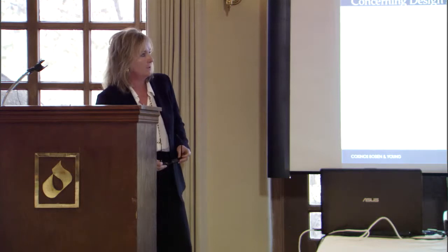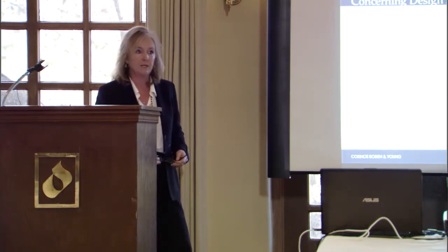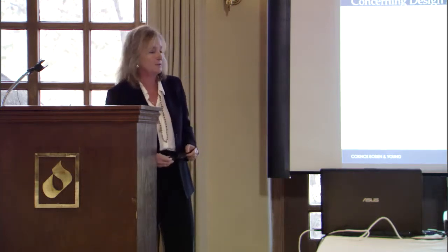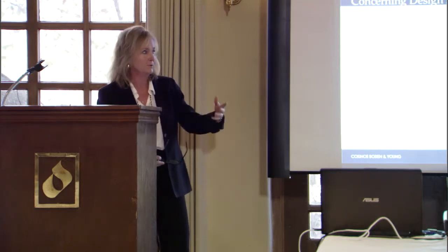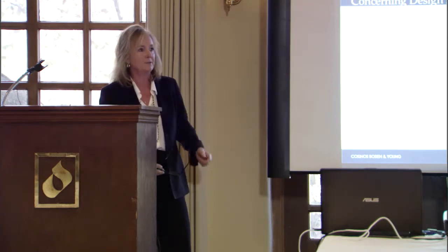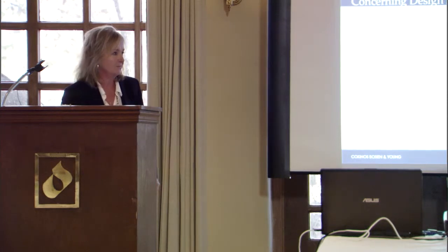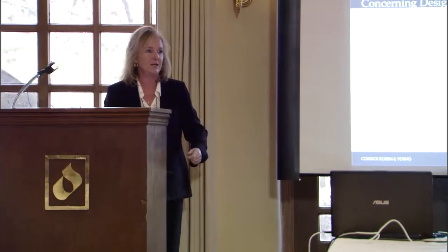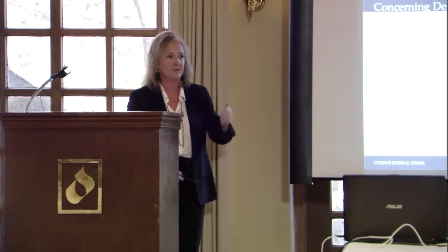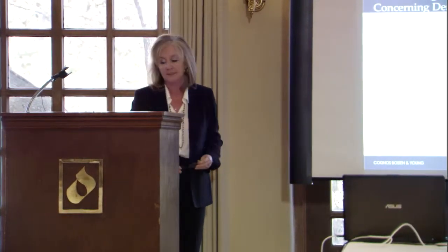Contractor sued the engineer saying defective plans. You had put a stamp on these plans saying that the project could be built in accordance with these plans. Look what happened. The court allowed the contractor to recover his $5 million because there was that stamp on there saying the project could be built in accordance with this engineer's seal, the plans are great.